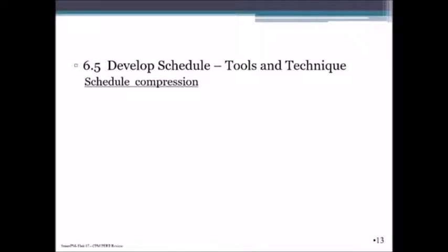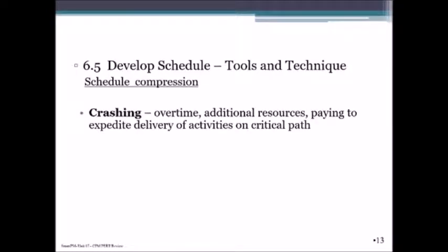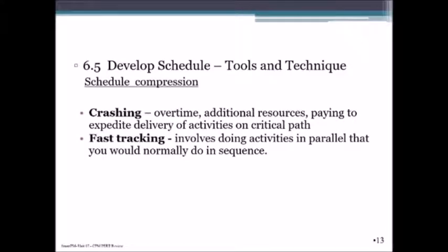Schedule compression. There are two techniques by way of crashing. I just remind students to think of crashing as where you're applying more, whether it's overtime, additional resources, maybe you're paying more to expedite from a supplier. In this case, you're crashing. Whereas fast tracking involves doing activities in parallel rather than doing them in sequence.